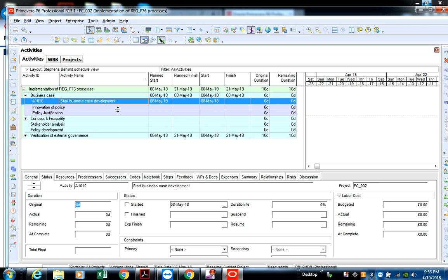Okay, so milestones usually have no durations. Okay, they have no durations because they are not an activity that's being performed. It's merely a stop check. Okay, so it just mainly is a stop check saying by this particular date we need to have either started an activity, or started a phase, or ended a phase. Now usually that would mean a start milestone usually will only have a start date. A finish milestone will usually only have a finish date.